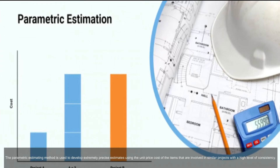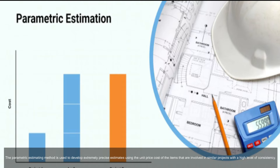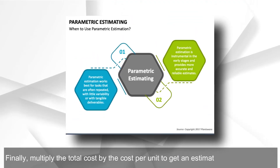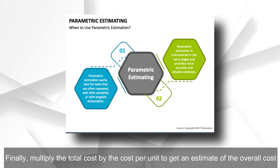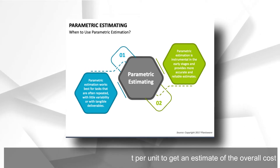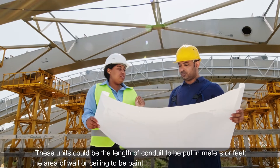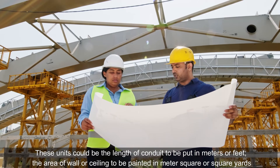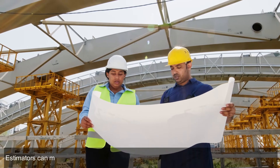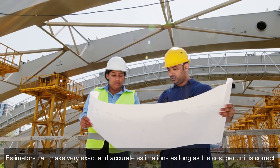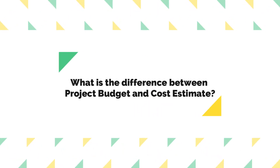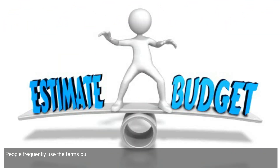Parametric estimating: this method is used to develop extremely precise estimates using the unit price cost of items involved in similar projects with a high level of consistency. Multiply the total quantity by the cost per unit to get an estimate of the overall cost. These units could be the length of conduit in meters or feet, or the area of wall or ceiling to be painted in square meters or square yards. Estimates are accurate as long as the cost per unit is correct.